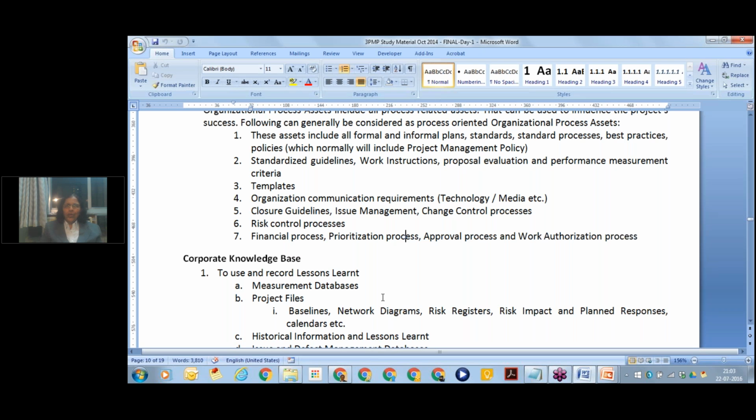Your management wants to know your tentative schedule, in how many months you can complete the hotel the customer is asking for. So you will look for similar previous projects in your organization and check the baselines. A similar hotel was built a year ago. How much time did it take at that time? Oh, 18 months. But I have better technology now, maybe I can complete this in 15 months. That is how I use previous data and previous baselines.